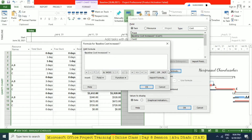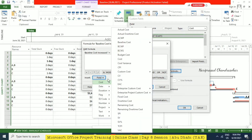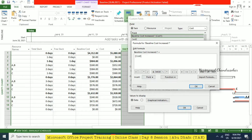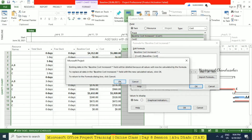Here you can go to Field and then see what all the cost fields are — baseline cost and then cost. You can go directly like this, or you can go here. So I'm going for cost minus baseline cost. Then I'm going to click OK, and you need to click OK again.